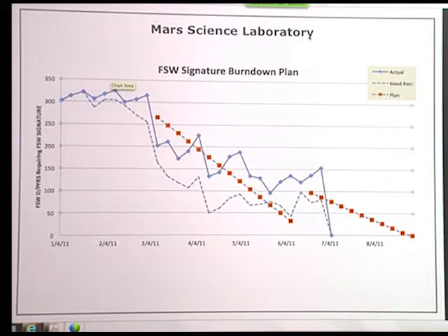But because they were coming in faster than we could handle, still with that effort, that gap between plan and actual started diverging. And as of June of 2011, you can actually see we had planned to be close to 0, but we weren't. And we actually did some corrective action, brought even additional resources on, and established a new plan, which you can see there, and we're able to bring that down. I don't think it actually quite went to 0, so we must have done something funny there. But with the chart anyway.